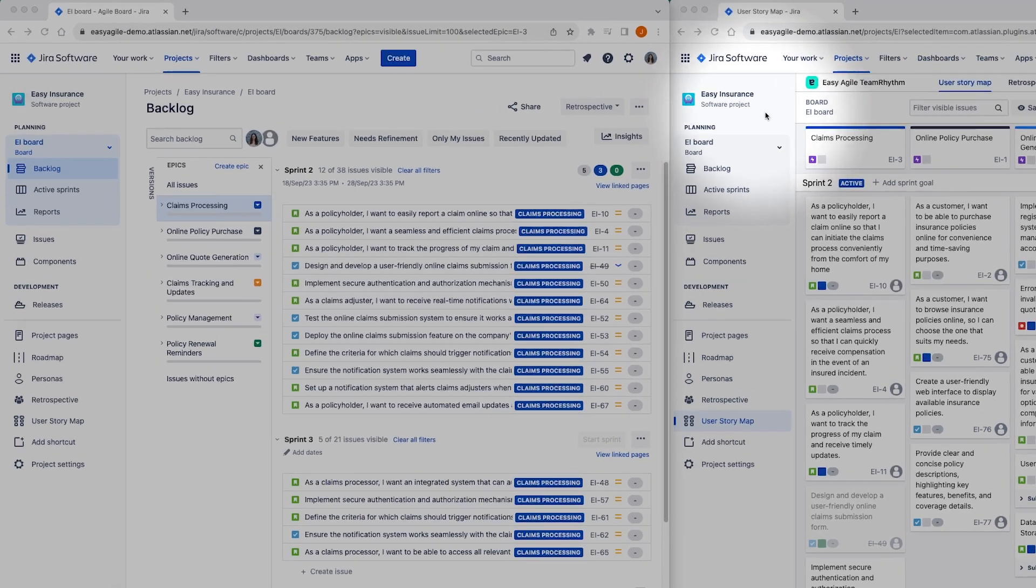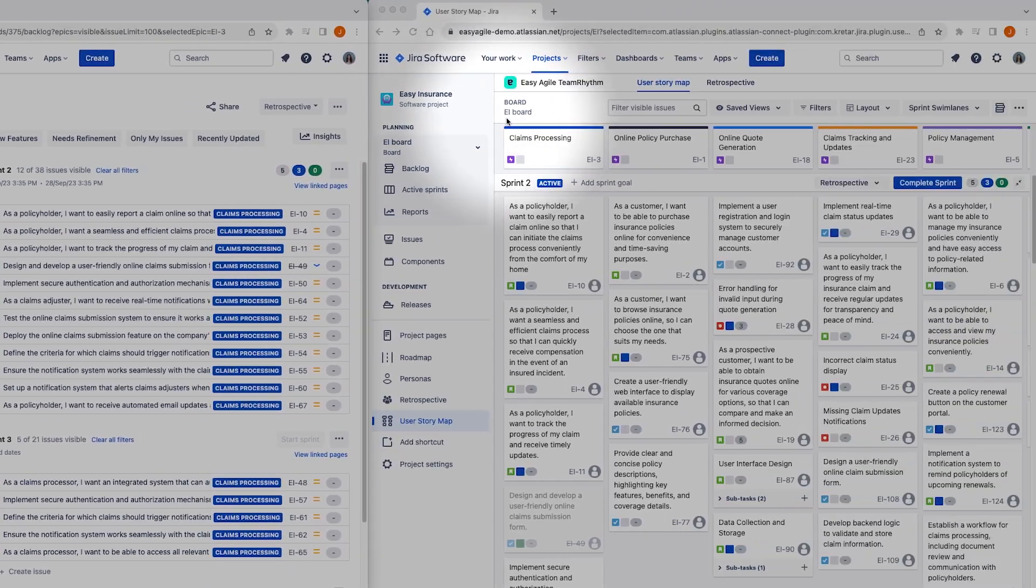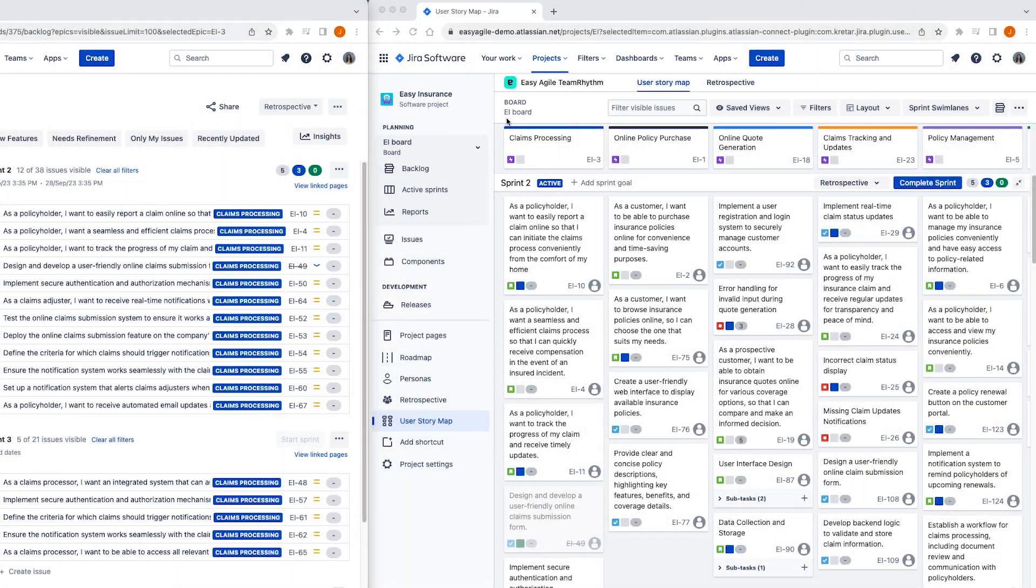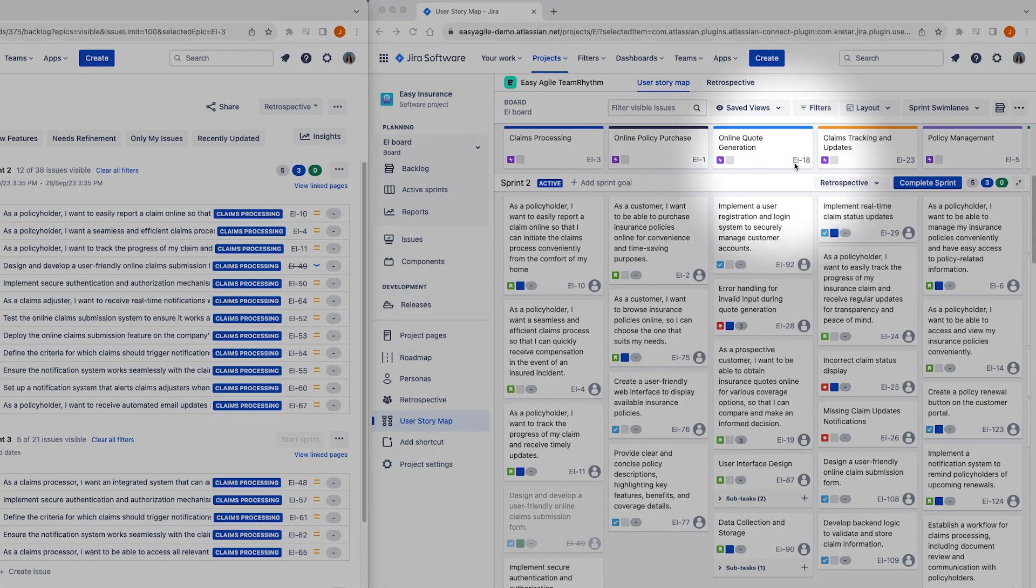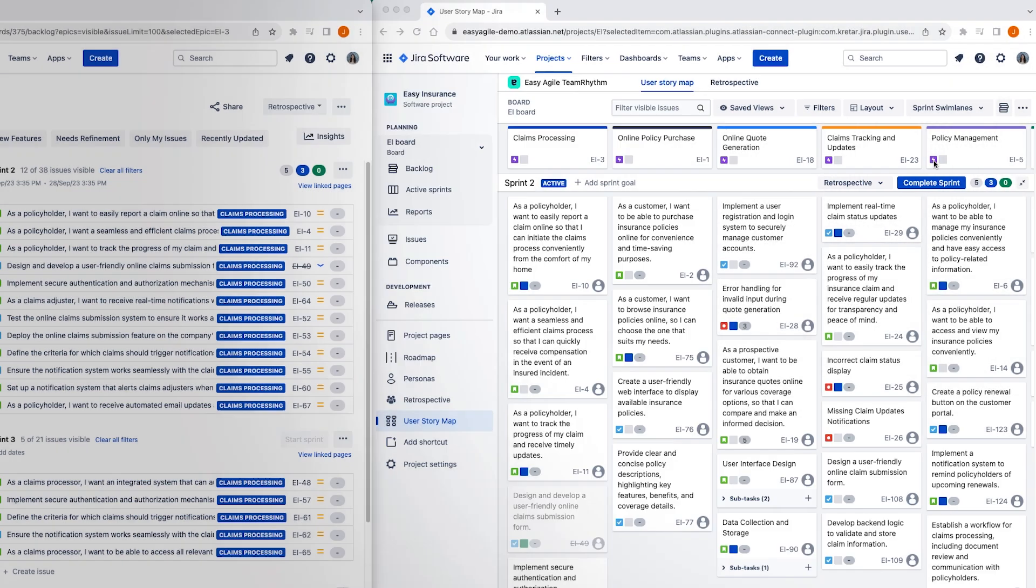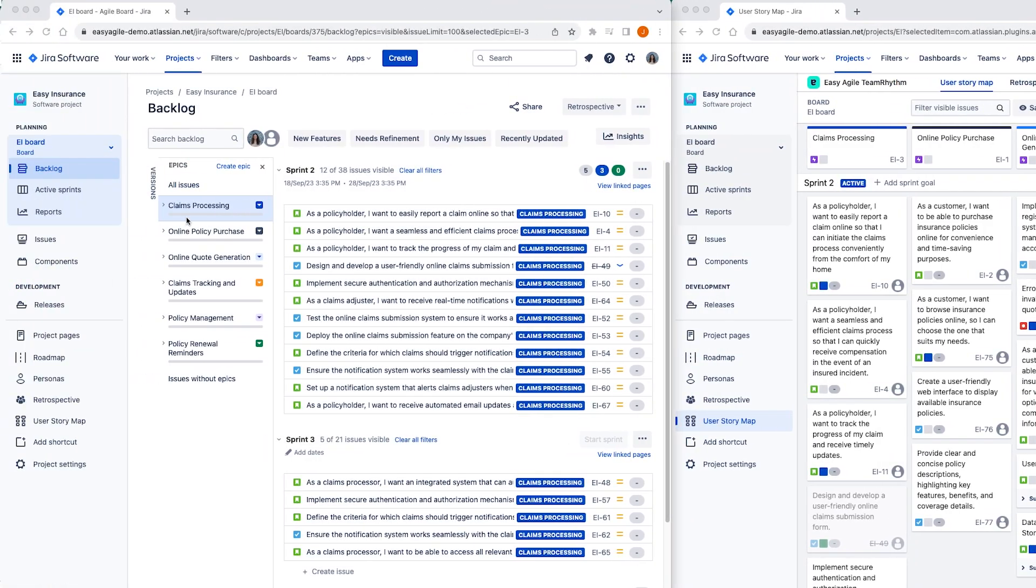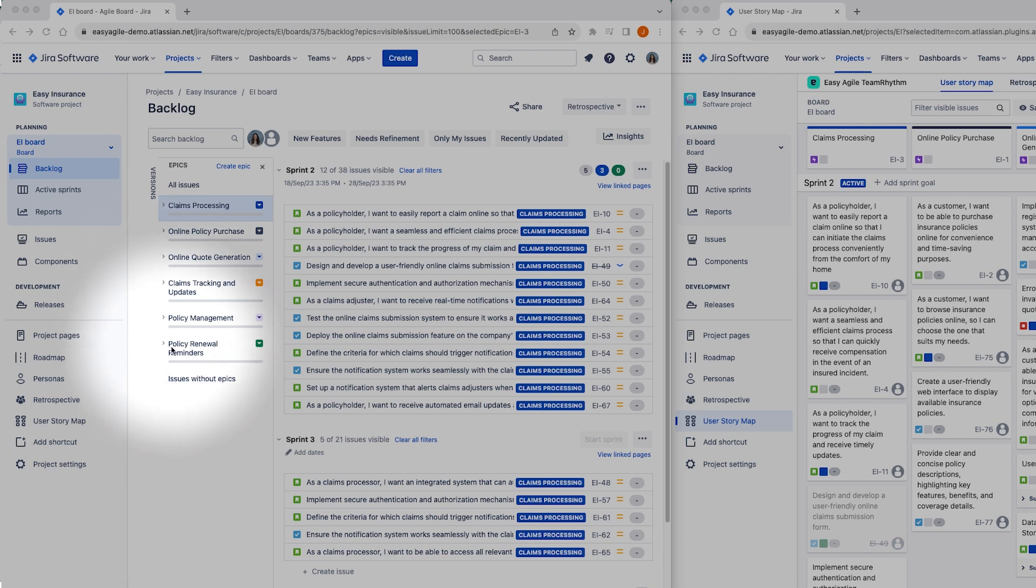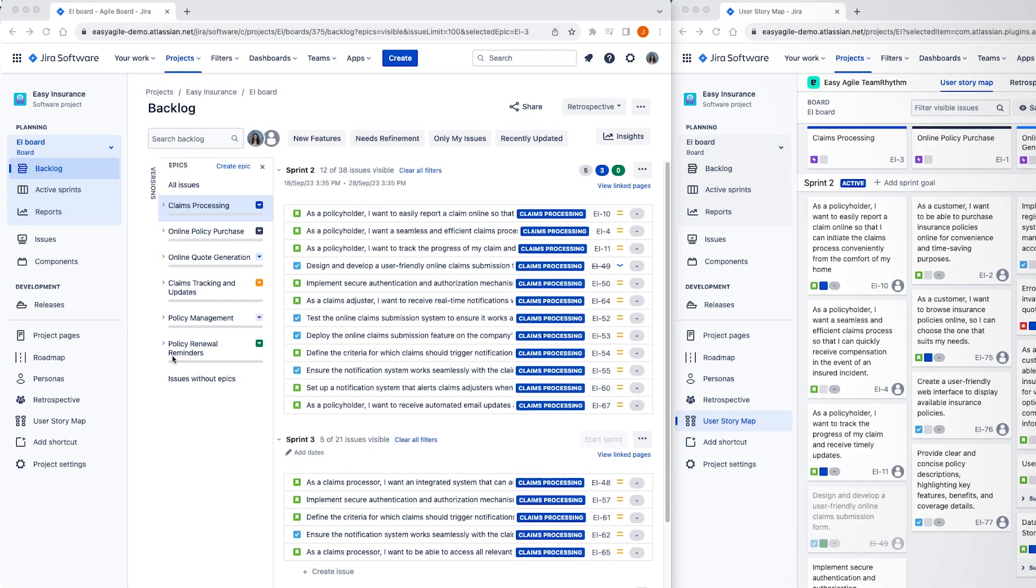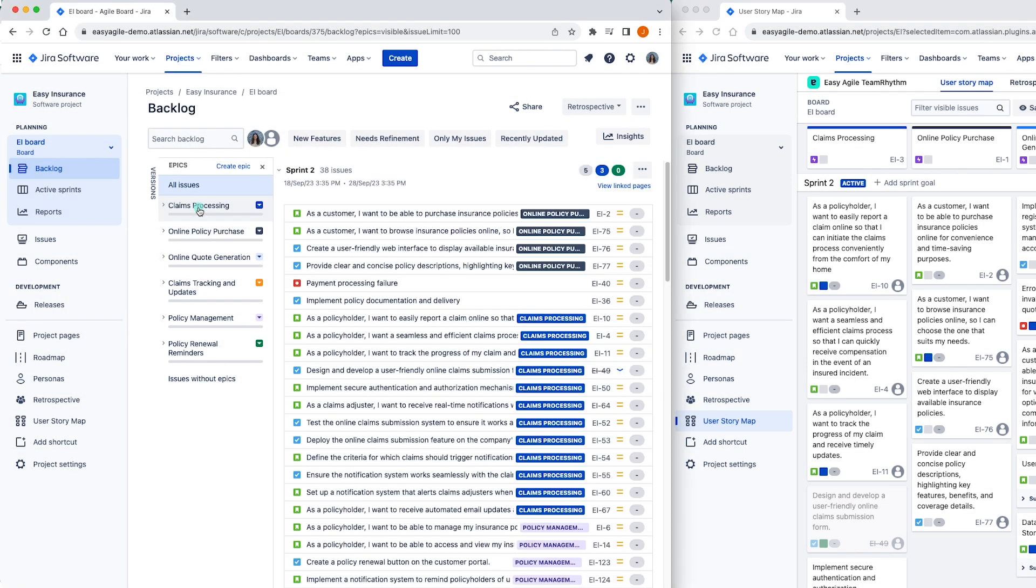At the top of the user story map are your team's JIRA epics that appear on your backlog. The JIRA epics are ordered left to right based on their ranking in your team's backlog. Beneath each of the JIRA epics from your team board are the JIRA issues that live on your team's backlog.